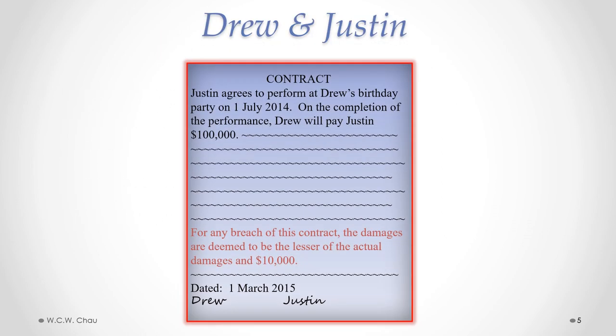Let's say this is the contract between Drew and Justin — a very simplified version of a liquidated damages clause. It simply says that if there is a breach of contract, the damages are deemed to be the lesser of the actual damages and $10,000. The effect of that is to cap the maximum amount of damages for a breach of contract to $10,000.